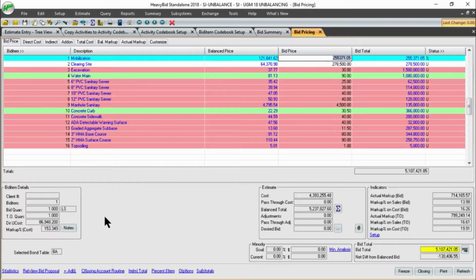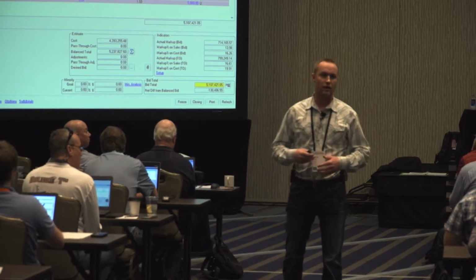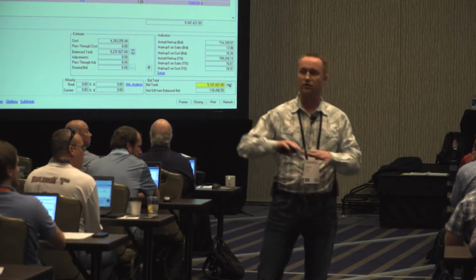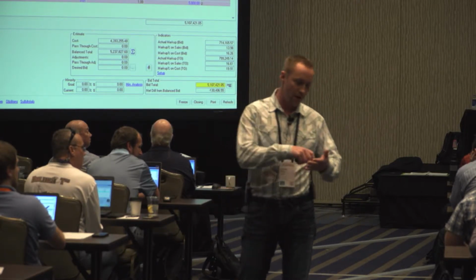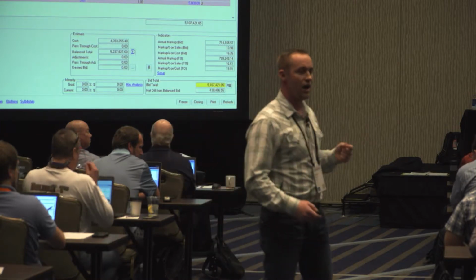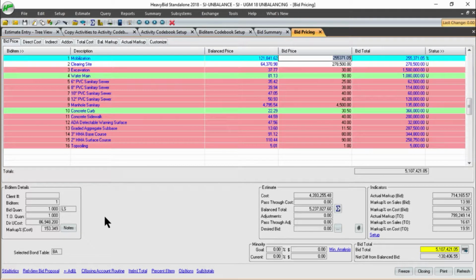If you've ever submitted a bid trying to take advantage of unbalancing and you don't have a negative here, you have artificially hidden what your risk is from yourself. On a lot of joint ventures, big joint venture partners say, I don't like to see that negative, so I just manually move it, and then we write down on a plus-minus sheet what we're risking. I'm like, but the system does it all. But they don't like to see that negative. You're just hiding from the risk. Here, it's right out in front of you, and everybody can see what it is.